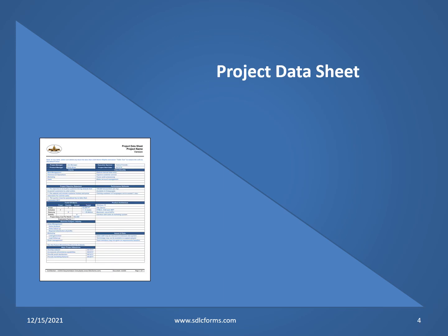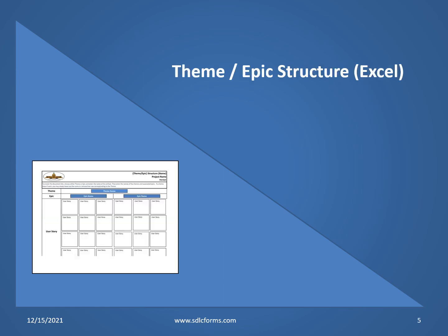The project data sheet, PDS, is, in terms of scope, schedule, and resources, how a project will deliver on a vision statement, and is a single summary of key business and quality objectives, product capabilities, and project management information.